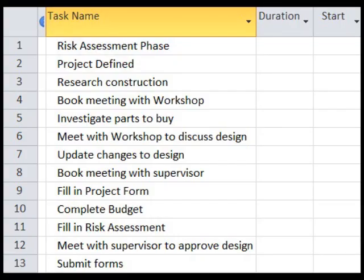Let's begin by looking at the risk assessment phase. Once we know what the project is, you need to research how you will build it, book a meeting with the workshop staff, investigate parts to buy, and meet with the workshop to discuss your design.